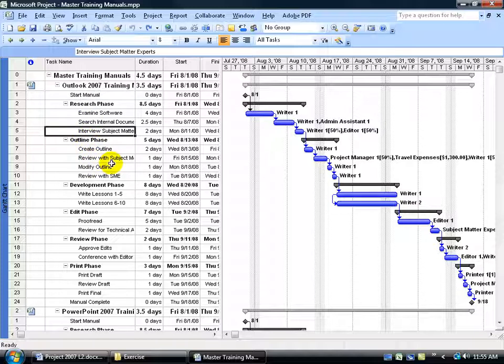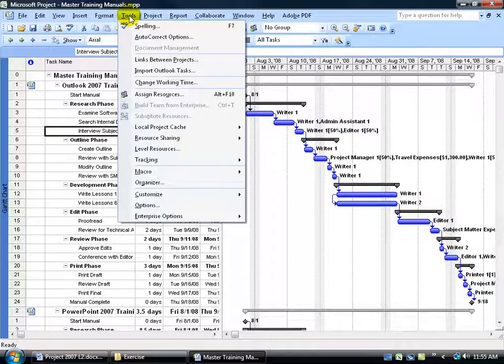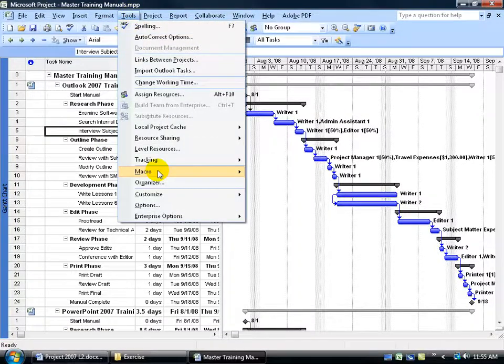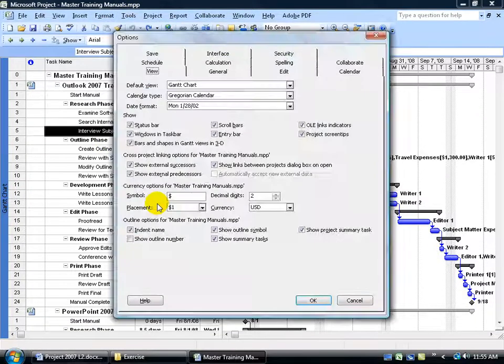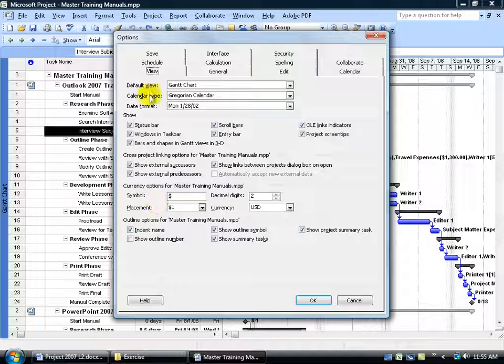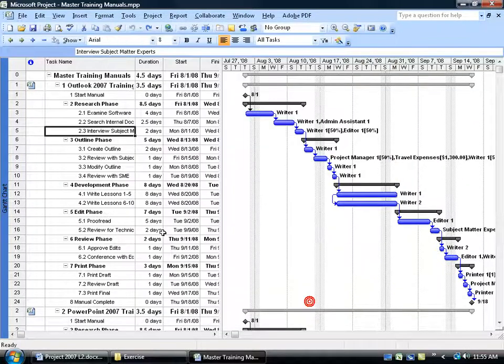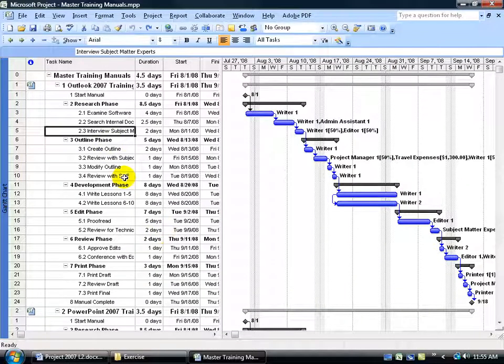If you want to use the default outline numbering system in the master file, come up here, click on the Tools menu, go down to Options, and then on the View tab, come down here and check Show Outline Number, click OK.